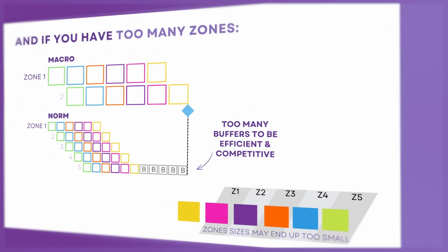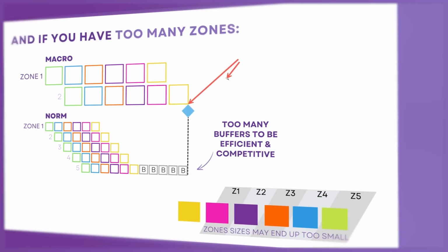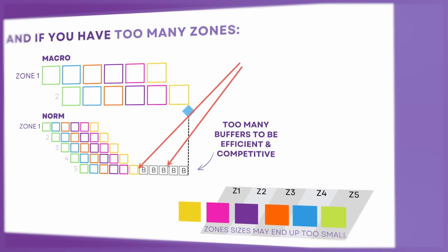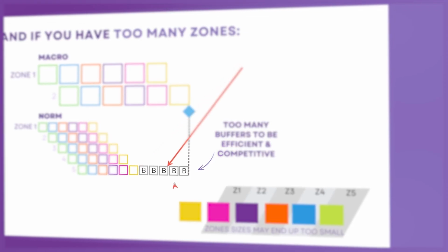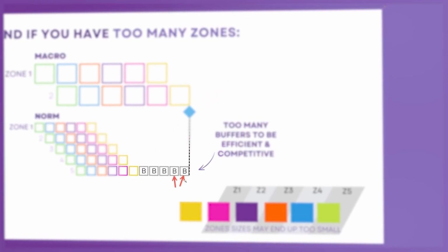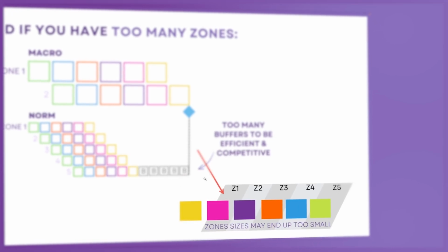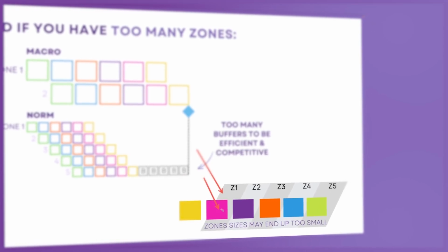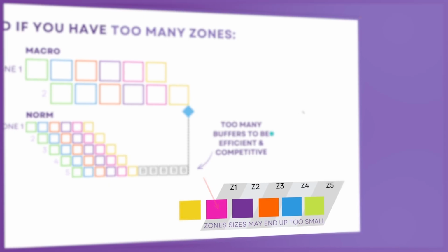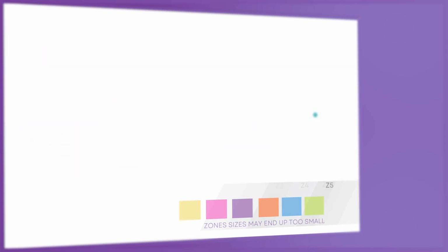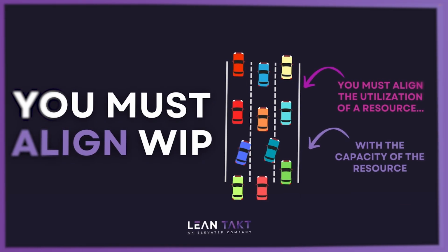Okay, super fine. Is there a point of diminishing return? Okay. If you do that, here's your contractual promise. You've gained time, but you've got more than enough buffers. Maybe you have too many. Like, let's say that if these two weren't needed, the owner's going to be like, hey, you're sandbagging. The other thing with this is your zone size might be too small for the wagon itself, and it may be too hard and cause too much dependency is what I call it. And that would be a problem, right? So these are things that we need to look at.